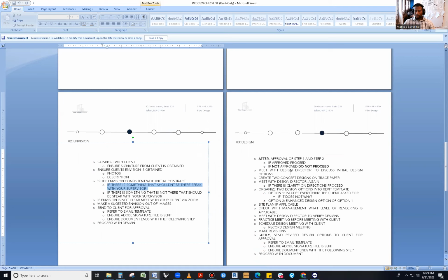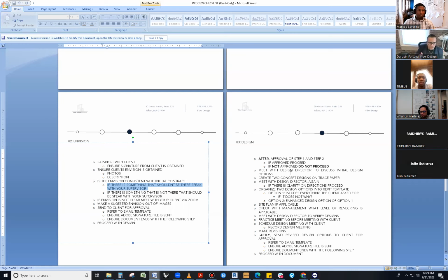Why? Because once you've already spent a whole week doing design options, it turns out that the design options you've been working on are nowhere near where the direction and the philosophy of the company and the client are going. It may be a whole total waste of time. And we've had that. We've had complete waste of time. A team is right now redesigning an entire project in Salem that was wrongly designed because the process wasn't adhered to. It has to be adhered to.